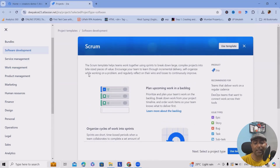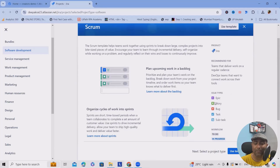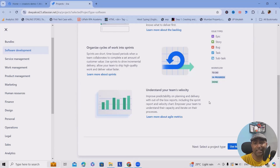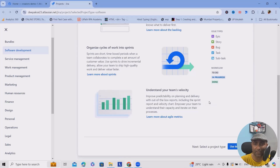The Scrum template helps you get issue types configured — that is epic, story, bug, task, and subtasks. We also have the workflow with statuses: To Do, In Progress, and Done. These are defaults, and we can also customize them according to our project requirements. Jira is a product where you can customize totally up to your needs — according to team size, project requirements, and the work you want to perform.